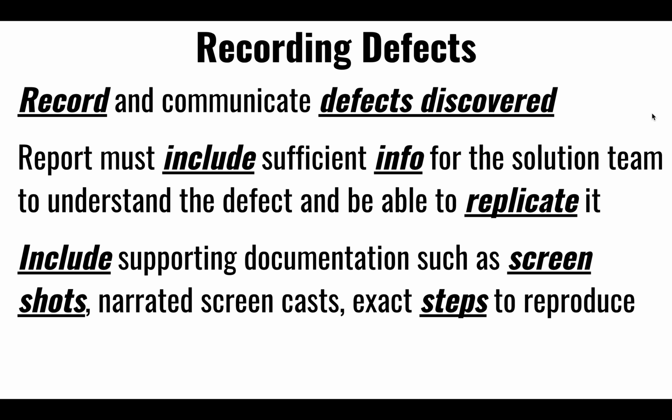Sometimes, depending on the severity of the bug, it might not be scheduled into a particular sprint, or if it's a blocker bug because it's blocking everybody else, somebody broke the build and nobody can do anything until the build is fixed, it might be drop everything you're doing, this is what we're fixing going forward. So what we're going to ask you from now on is to record these defects and assign them or leave them in the backlog.